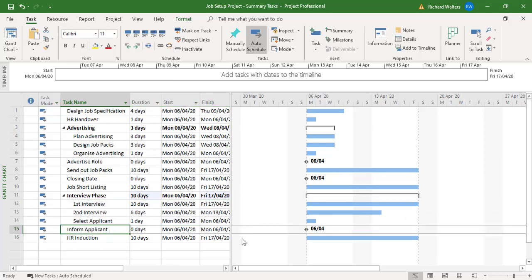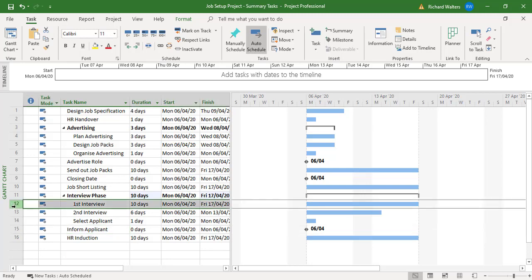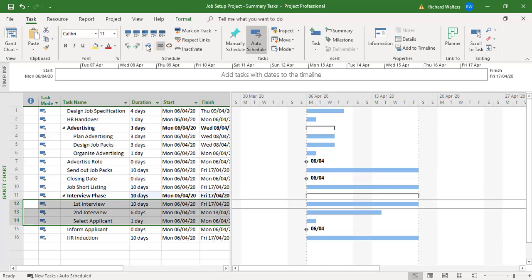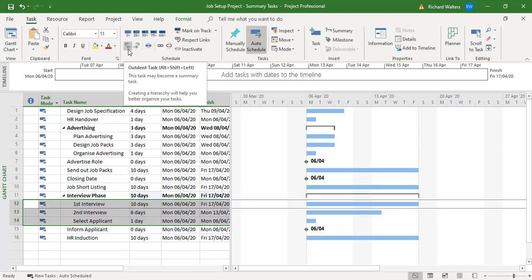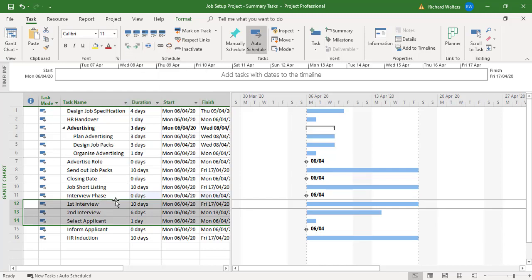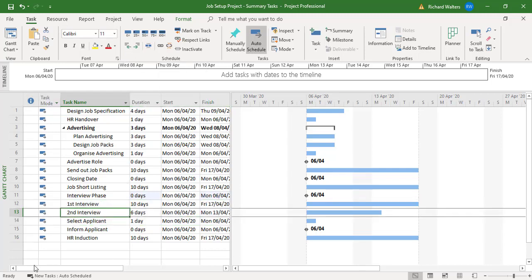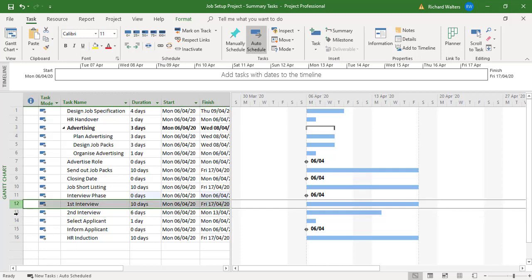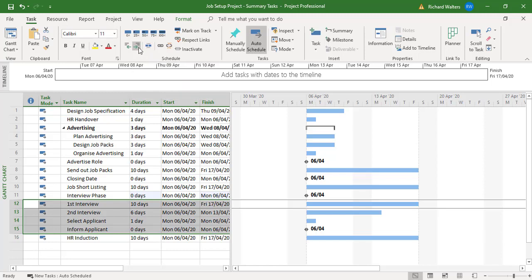To get rid of the summary task, you highlight the tasks inside the summary task and then outdent from the schedule section of the task tab. Now I'm going to highlight the four that I want and then produce the indent. And here we go.